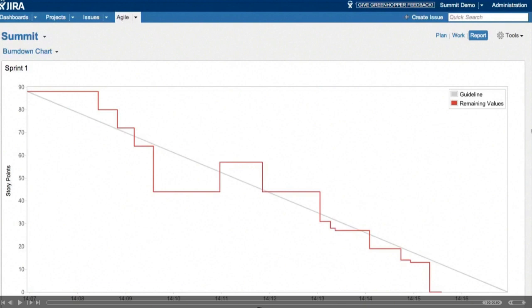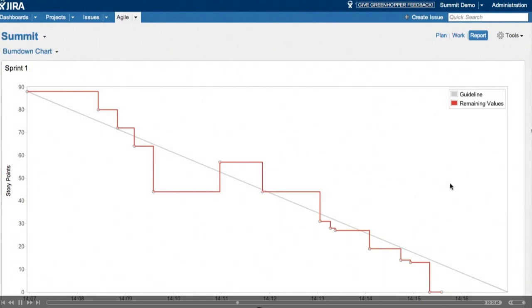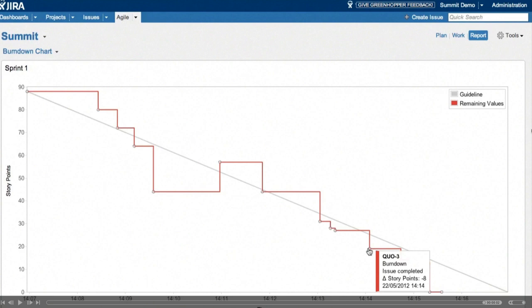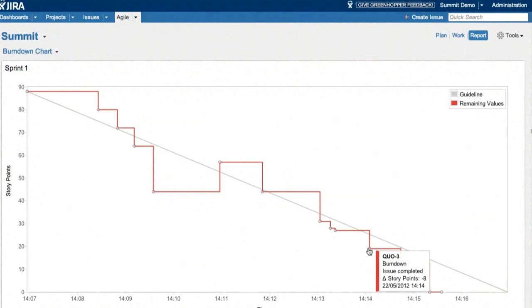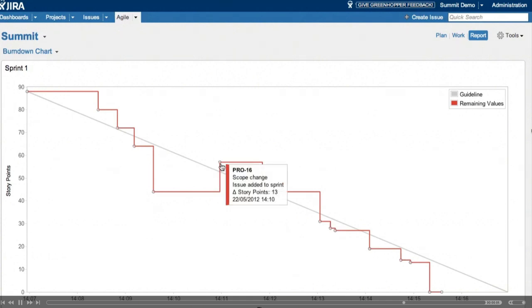If you look at the burndown chart, you can see it's quite angular. And the reason for this is it's real time. As you hover over the burndown, you can see that there's a tool tip for every event that happens in the sprint. In this case, we can see that this issue was completed and eight story points were burned down. We also see in the middle of the burndown that the line goes up rapidly. And on investigation, we can see that that was scope change. In this case, 13 story points were added to the sprint after the agreement and the start of it.